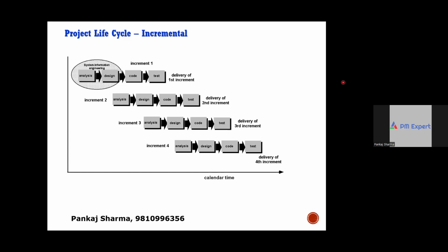Projects are big, decently big, and there's a level of uncertainty, but the planning horizon is around, let's say, 2 months. You have visibility in the range of 2 to 5 months of what you have to do. So such projects can follow incremental approaches, where the entire scope can be delivered in small increments, and every increment is called a phase. So here the project is managed based on phases or stages, right?